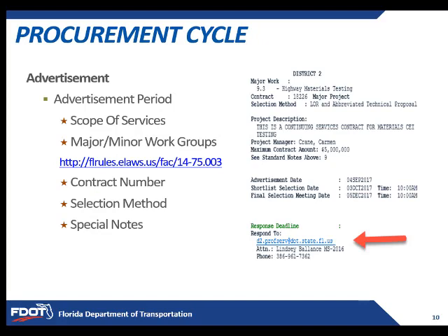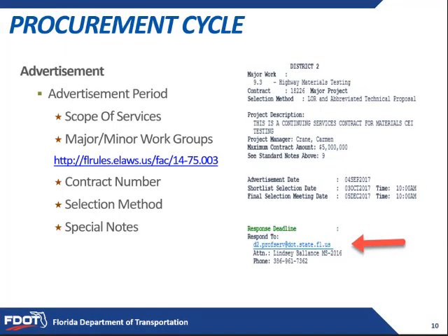Then we move into the advertisement period. So with the advertisement period comes a cone of silence. So with that, no direct communication between the team and the consultants. All communication is routed through PSU. Procurement advertisement contact.